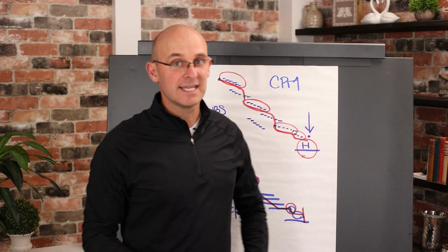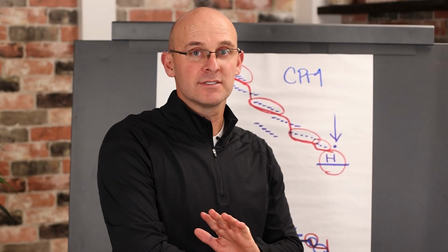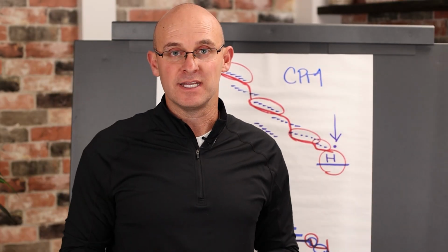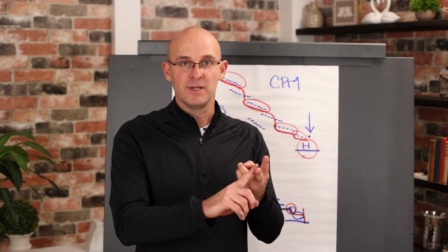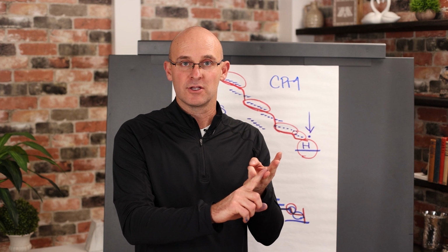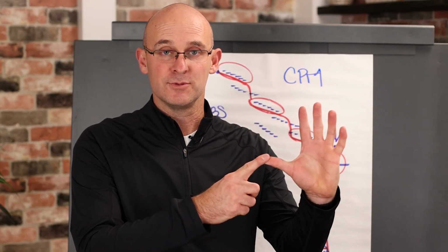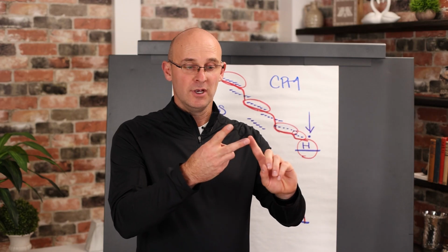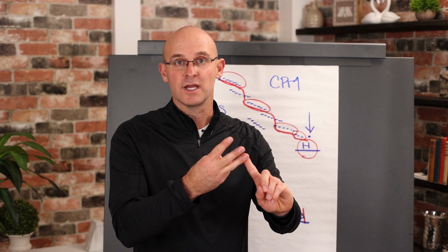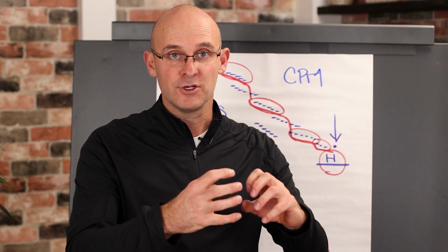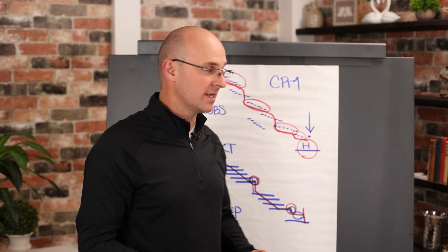And when you start stacking activities, that is the worst thing that can happen. That brings all of the other productivity impacts that we've talked about in other videos. It's going to slow down your workforce. It's going to make team sizes too large. It's going to bring in context switching. It's going to change your leaders. It's going to have leaders focusing on too many projects. It's going to make sure that you don't have time to install it right the first time. You'll start working overtime. You will stop looking at roadblocks, and your whole system will break down, and you'll go into a state of decay or into a state of chaos.